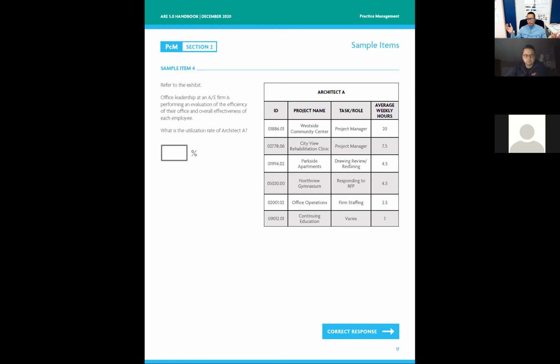If 80% of your hours are billed to a project, 80% of your hours are billable. The other 20% are overhead. We're not making money off of those. A marketing department person is almost 100% overhead. They're non-billable. So you have to make sure that you have your staff team properly assigned and allocated for the different projects that they do.